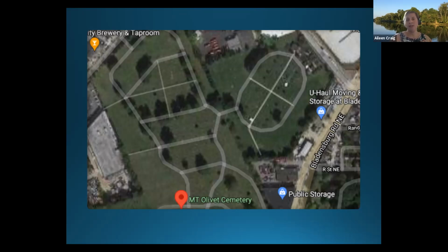And part of this is done before we do anything. And then it's during our master planning stage, which is where we put in the footprints and have a lot of these conversations. And this is all done before we do any design. And then once we have the master plan, we then take that to meetings with the management of the cemetery. We presented it to the Catholic Archdiocese of Washington, to the board, and at ANC community meetings, to make sure we heard from the voices of people who use the cemetery before we really got into detailed design.